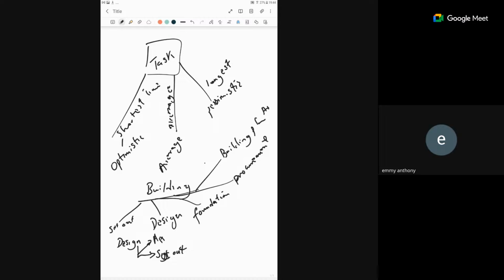Now let me explain. While the design is going on, can approval and designing be going on simultaneously? Yes, it can. Good. So you see that these two activities can be grouped together. That's what we are saying. So by grouping these two activities together, I'm already saving time.